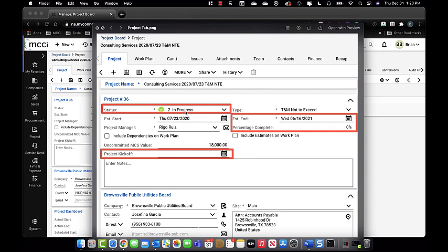Second, you will also have to have this updated, your estimated end time. When do you anticipate the project completing? Third, percentage complete. What is the percentage? How are you going to figure that out? That is going to be an item of, say, 50%, 25%. At this time, it is your educated guess on what that percentage is.